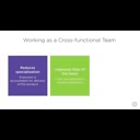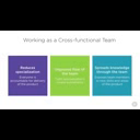If you finish an item and notice that there are items in the testing column that aren't actively being worked on, take the opportunity to see if there's any way that you can help test them to keep the flow moving. Peter will probably need to be the final tester on any item, but a lot of items would benefit from at least an initial rough pass by another member of the development team while Peter is busy working on others. Not only will this help you move items across the board as quickly as possible, but it will also expose each of you to areas of the product you may not have been exposed to otherwise.